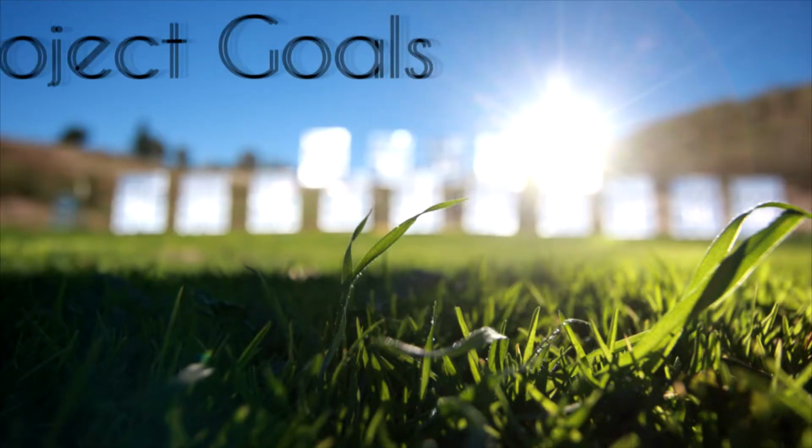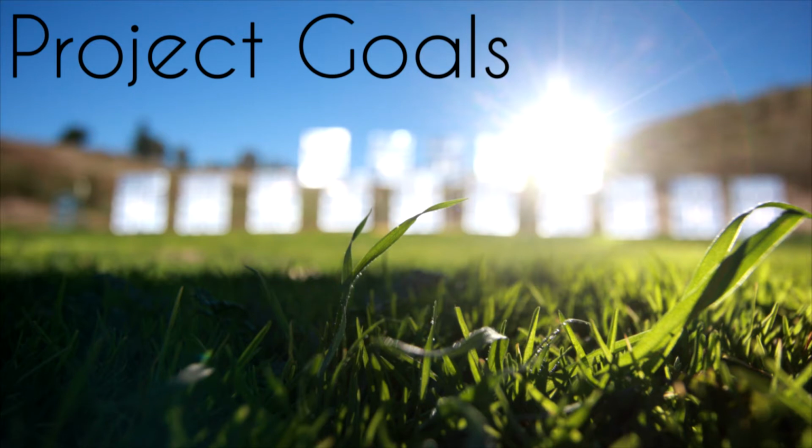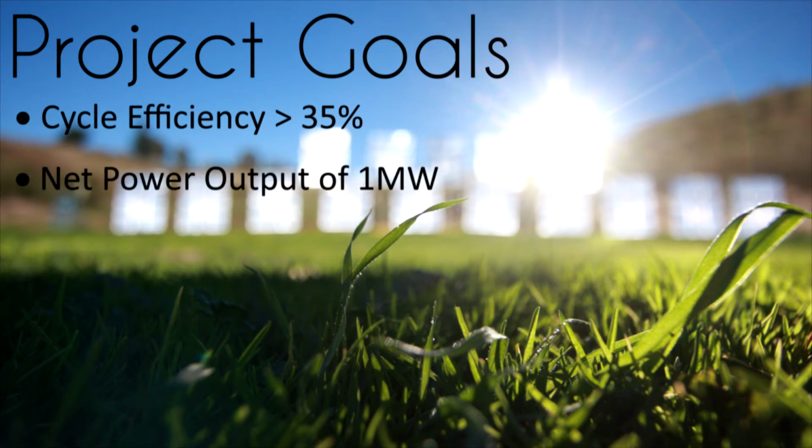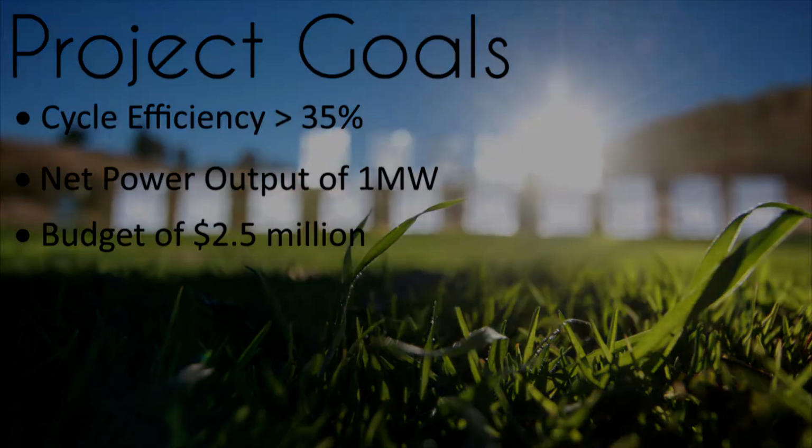There are several aims that we need to meet to make sure this project is a success. The main goal is to achieve a cycle efficiency of at least 35% while generating a net power output of 1 megawatt. The project is constrained by a budget of $2.5 million and the need to minimise water usage.